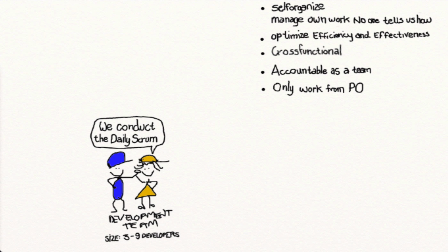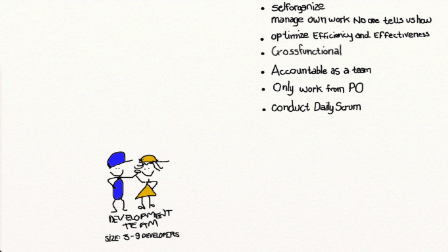Daily Scrum is often referred to as the heart of Scrum. This daily recurring event is conducted by the development team. It's important to emphasize that this is the development team's meeting with the purpose to ensure that we as a team are on the right track and will be able to accomplish the sprint goal within the boundaries of the current sprint. The Scrum Master, as one responsible for the Scrum process, will make arrangements so everyone knows when and where daily Scrum is happening, which is the same time and same place every day. But should the Scrum Master not be present, the daily Scrum will start on time by the team themselves.